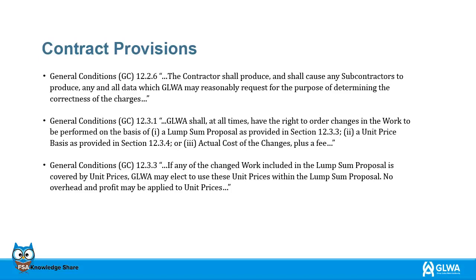General Conditions 12.3.1. GLWA shall, at all times, have the right to order changes in the work to be performed on the basis of 1. A lump sum proposal as provided in Section 12.3.3. 2. A unit price basis as provided in Section 12.3.4. Or 3. Actual cost of the changes, plus a fee.